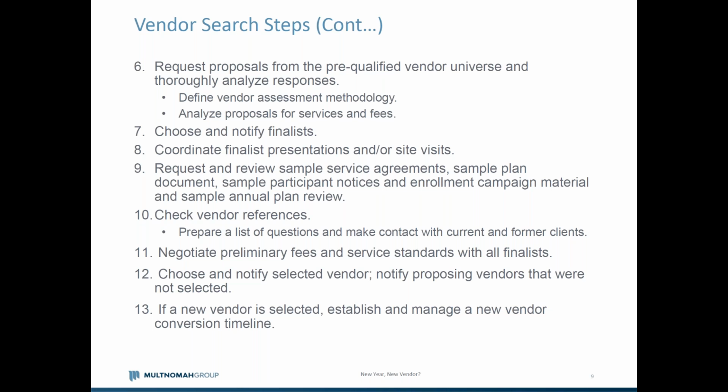So I would say that the request for proposal should be out with the vendors for at least a few weeks. I wouldn't give them too long because people tend to procrastinate, but a few weeks to coordinate resources.